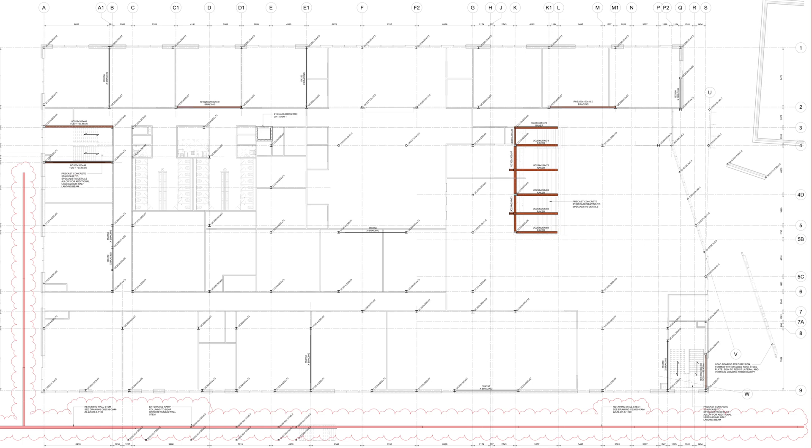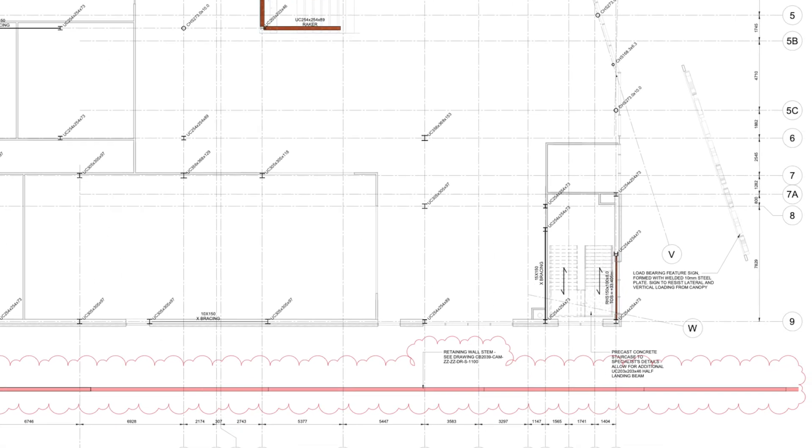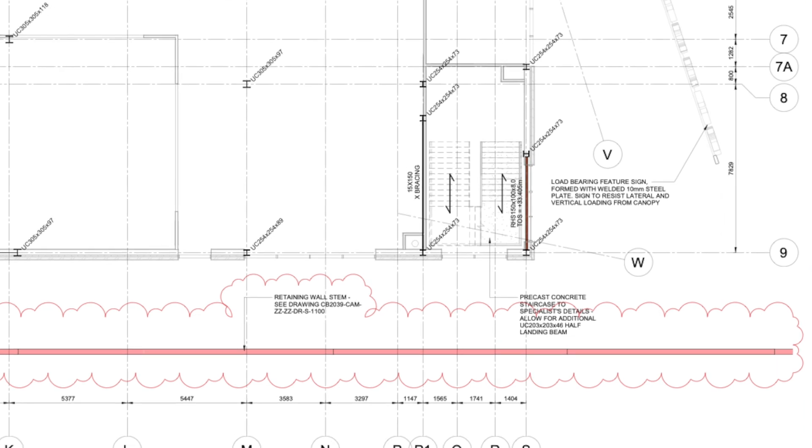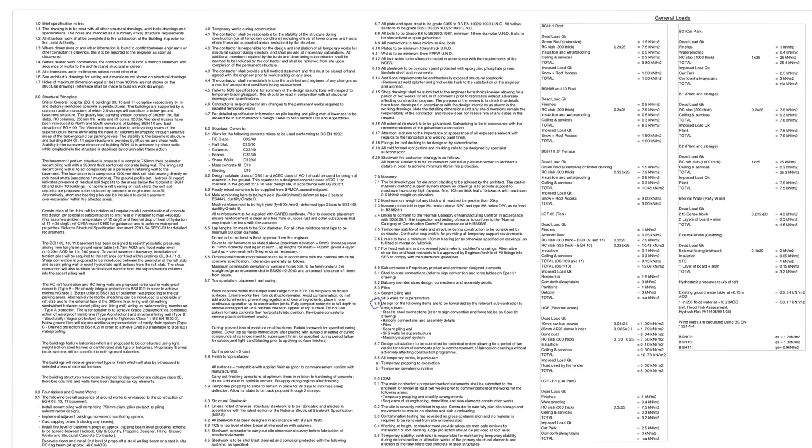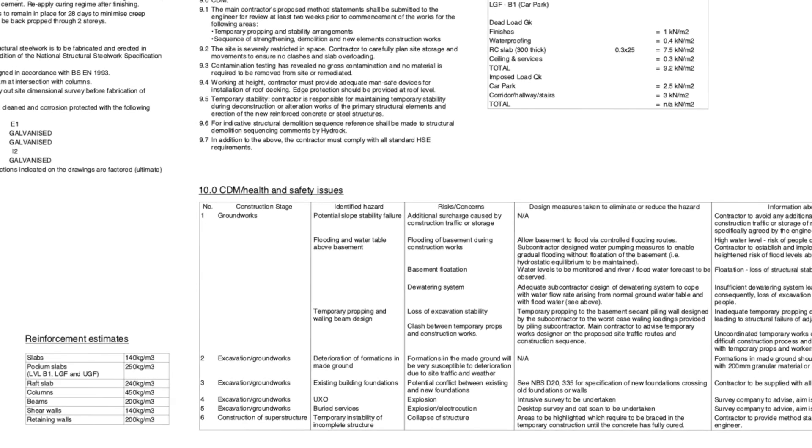The key point of stage 3 is submitting your information for the contractor to tender. It's really important that you get the right information in your drawings or reports. It's okay to make changes later on, but you need to completely highlight all the assumptions you've made and alert the contractor or the person tendering that they need to make allowances for some unknowns. For example, reinforcement rates — at RIBA stage 3 you won't have done the full concrete frame design, so you need to put down indicative rates for beams, slabs, columns, and walls so the tenderer can price it.